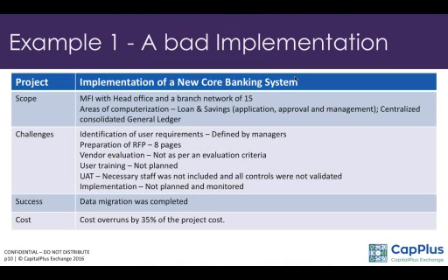Then the next one was the RFP. When I see an RFP of 8 pages or less, or 10 pages or less, I know at once that this is not going very far. You can't define your user requirements in 8 or 10 pages. And believe me, most of the institutions, microfinance as well as financial institutions, when they start computerization projects, their RFPs are 10 pages or less.